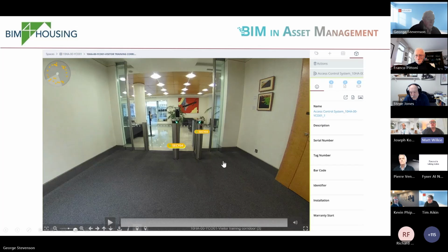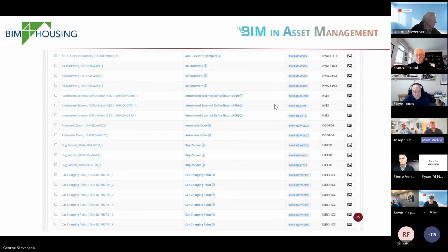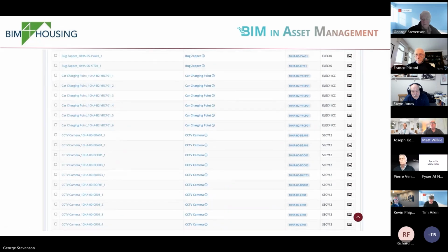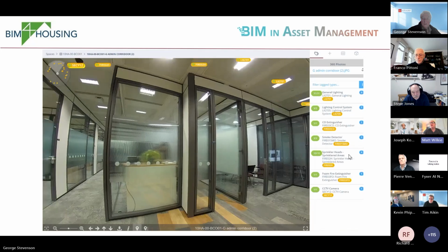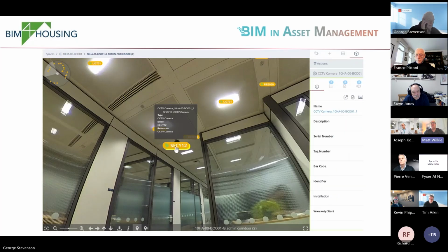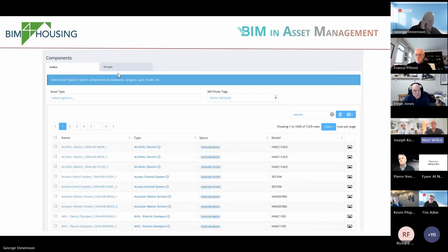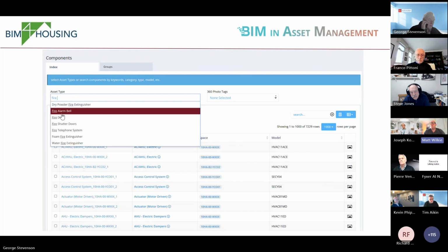So what we're actually looking at is our main focus now in the industry is for handback. And one of the key issues we're having is understanding where most of the estates are, because a lot of the obligations sit with the FM companies that tell you everything's been fine for 20 years. So as part of the due diligence piece, we have to make sure it is actually fine. And although the fire strategies in theory don't actually sit with us, they may sit with the NHS, they may sit with the FM, they may sit with tenants. In reality, we need them to be correct.